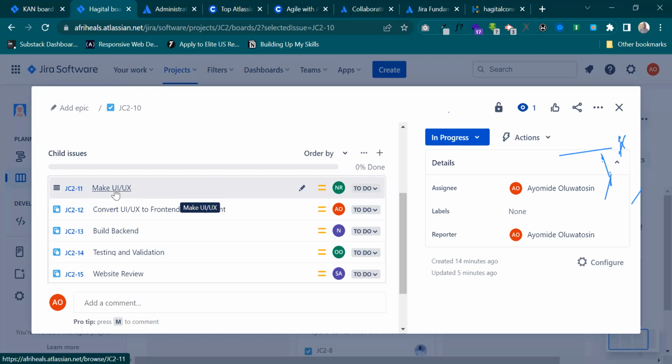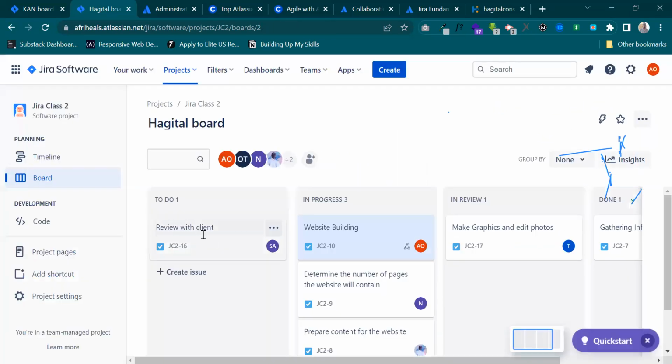I've seen cases whereby I have to give them like 24 hours to just look through the site. Is this exactly what you want? Of course, there will be some things that you really do not like. Once the sample section, the prototype, has been approved, then we go into development. So the only review that would now be done in the final section is just, does the website actually do what we want it to do?